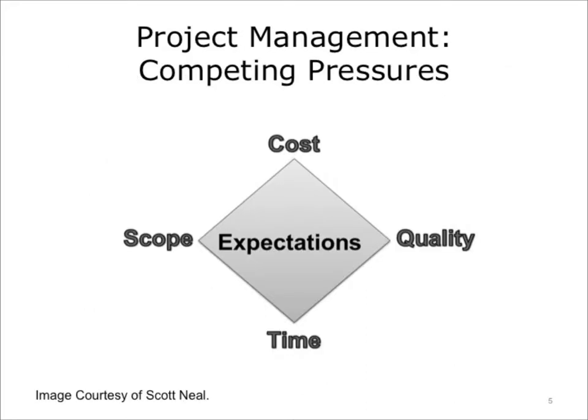As this picture suggests, successful project management means effectively balancing the components of time, cost, scope, quality, and expectations, each having a symbiotic relationship as represented by the diamond shape in the center. This is referred to in project management circles as the project diamond. The concept is quite simple. When a user requests an additional report, not originally agreed on in the project specifications, the project's scope and quality change, resulting in an imbalance and skewing the shape of the diamond unless changes in the remaining components are made to bring the project back on track. We refer to this relationship as the project diamond.